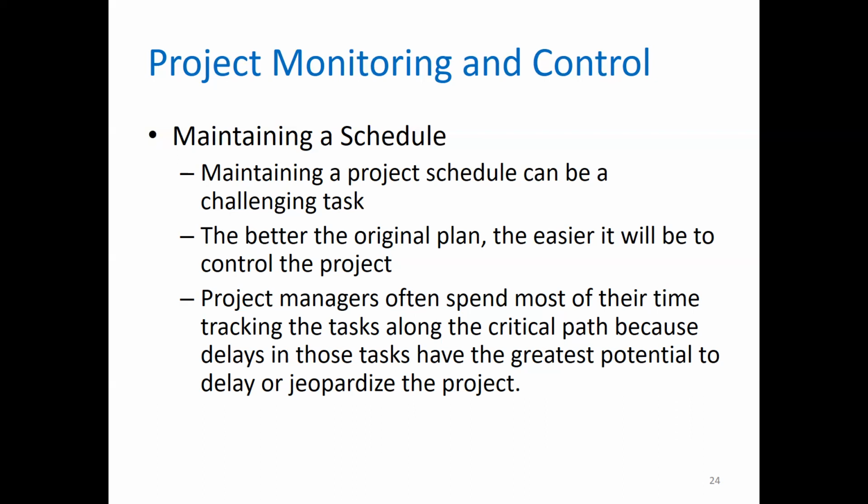Now, this is a general saying: when you try to allocate task durations, or when you try to allocate time for your project tasks, always try to overstate rather than understate. In other words, if you're very sure that a particular task will be finished within, let's say, 10 days, instead of allocating 10 days, allocate about 12 or 13 days. Why?